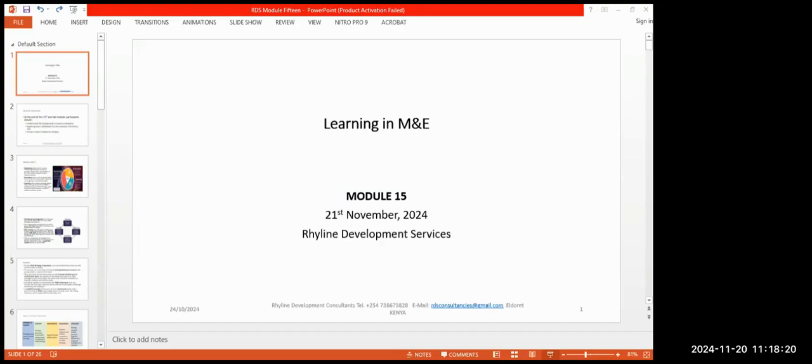And evaluation, which is also done periodically, many times in the middle of the program or in the final part of the program, is basically to check on the effectiveness of a program while it's going, but more I think is done when the project is complete. Although from experience, to avoid learning mistakes too late, it's good to, just like monitoring, do evaluation internally as regularly as possible, so that you don't wait for the last moment and probably regret why certain things were not done.